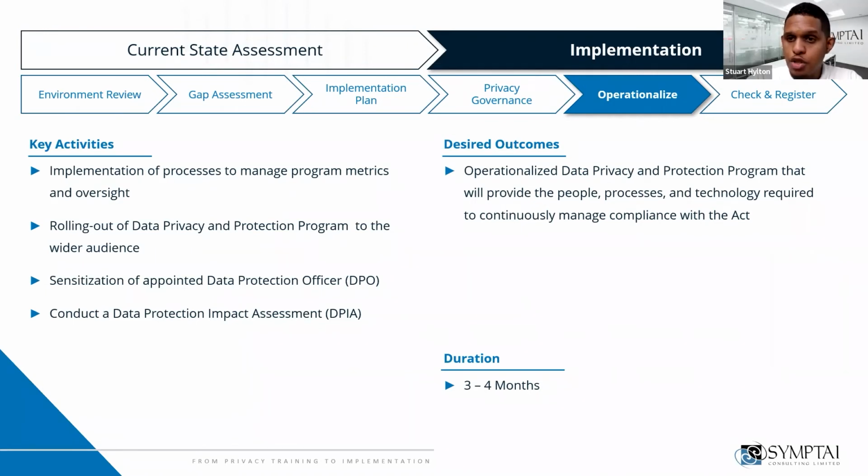So you can imagine trying to do a data protection impact assessment for your entire organization, where we're trying to understand, here's all the data we have, here are the protection mechanisms, identifying each risk, identifying what is the control that we have in place to manage that risk. This could take 1 to 2 months, depending on how quickly and how available information is.